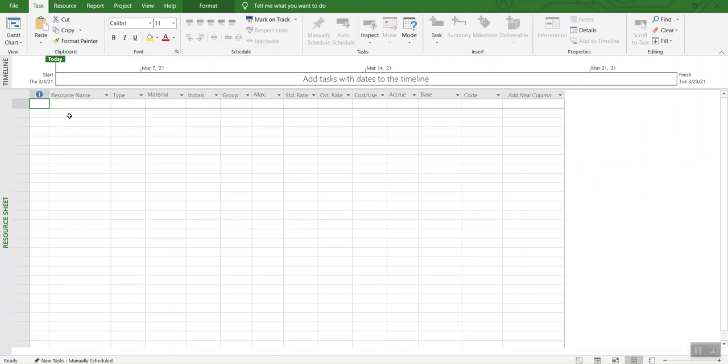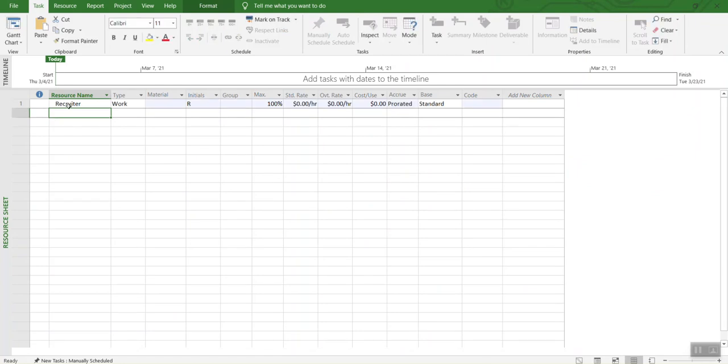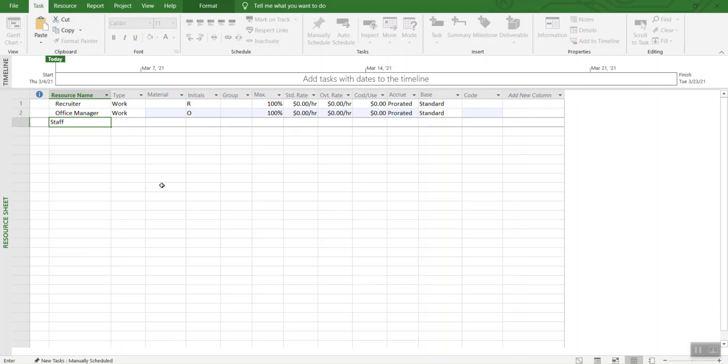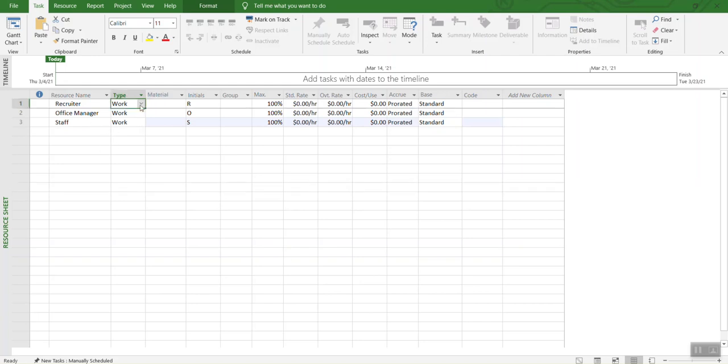Our first resource is recruiter. Then second resource we have is office manager. And third resource is staff. As you can see, as I define all these resource names, it's automatically going to select the type of the resource which is work.